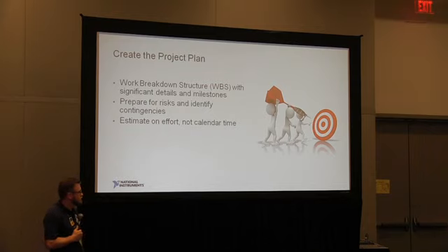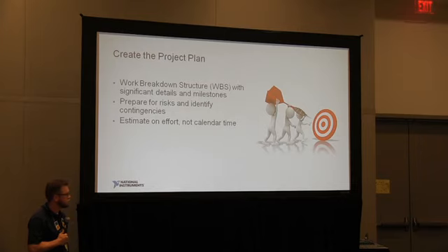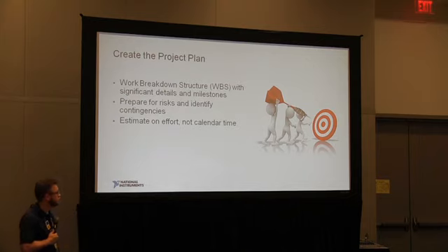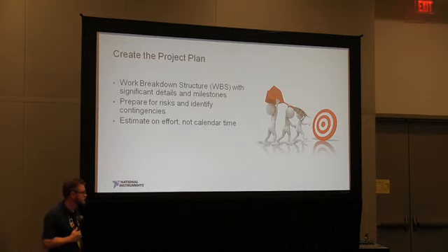I think overlooked tasks are a contributor to projects not being completed on time. We're focused on getting the software and the hardware all integrated, getting everything ready to release, and it's, oh yeah, we forgot about an operating procedure, a calibration procedure, a test plan, a maintenance procedure. All these things were listed out in the contract early on, and we forgot about them. So having those listed in the work breakdown structure helps ensure that you don't miss those items.